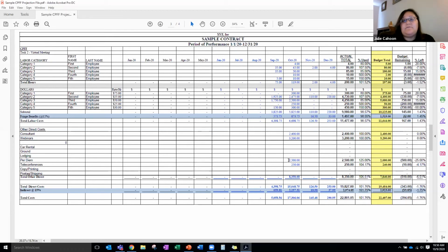And so maybe you have a few more folks presenting than you had originally planned, but it fits for the conference. And so you'll see that you have an additional $500 for honorarium. And that was maybe unanticipated. And so depending on your grant requirements, you may need to get something like that approved. And so you'll need to approach your funder about that.